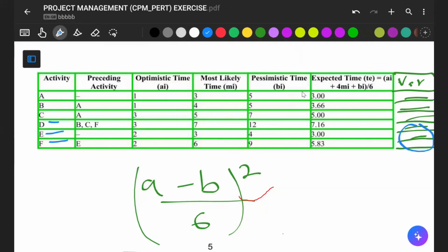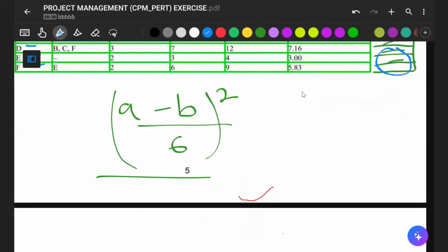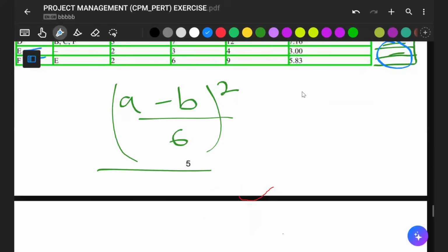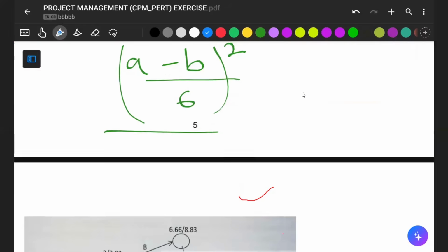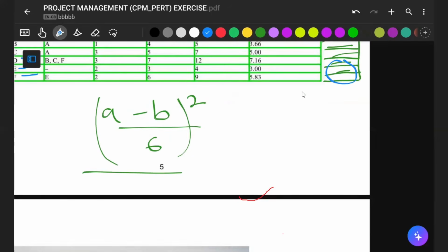So when you get your variance, whatever the value is, you will then have to use it. You apply the probability of X. If I am saying that it should be 18 hours, less than or equal to 18 hours, that's what you are looking for.